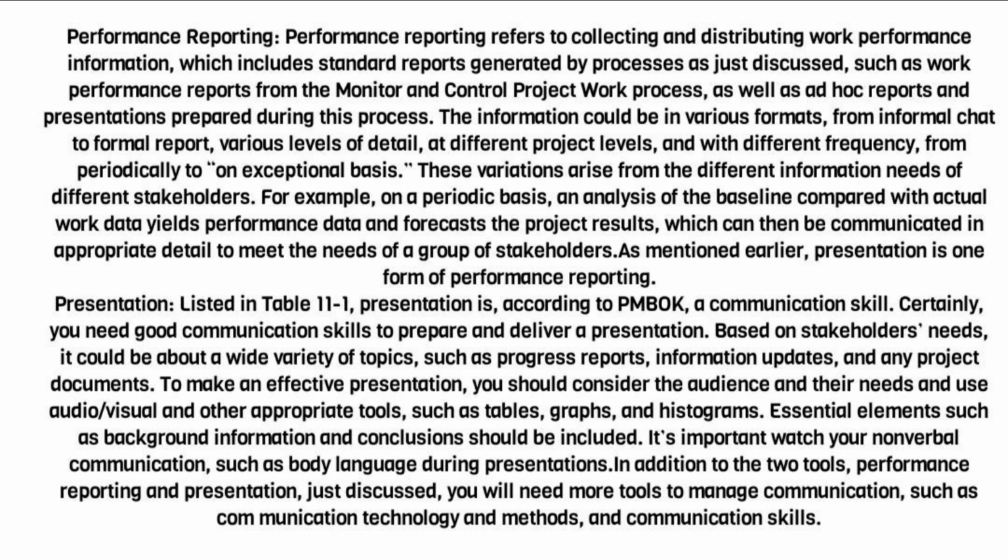The information could be in various formats, from informal chat to formal report, various levels of detail, at different project levels, and with different frequency, from periodically to on exceptional basis. These variations arise from the different information needs of different stakeholders. For example, on a periodic basis, an analysis of the baseline compared with actual work data yields performance data and forecasts the project results, which can then be communicated in appropriate detail to meet the needs of a group of stakeholders.